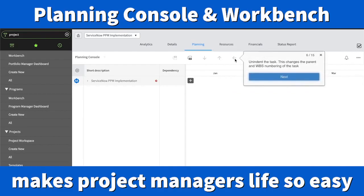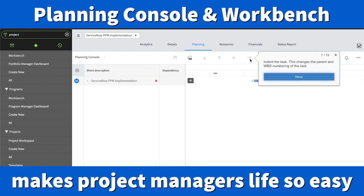The arrow pointing to the left lets you unindent a task. This will change the WBS numbering of the task. Some of you might ask, what is WBS? It stands for Work Breakdown Structure. You can indent or unindent using that arrow. Here is another way of indenting and unindenting the WBS — the Work Breakdown Structure list. Once you click there, you can change the WBS number of the task.